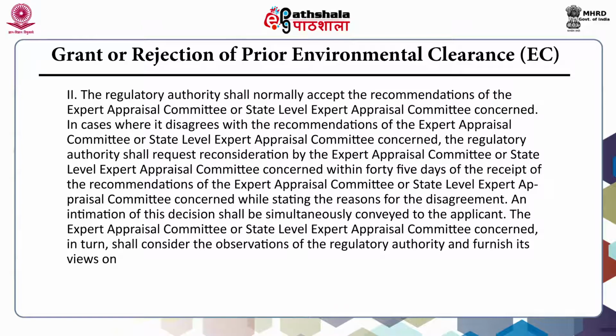In cases where it disagrees with the recommendations of the Expert Appraisal Committee or State Level Expert Appraisal Committee concerned, the regulatory authority should request reconsideration by the committee concerned within 45 days of the receipt of recommendations, while stating the reasons for the disagreement.